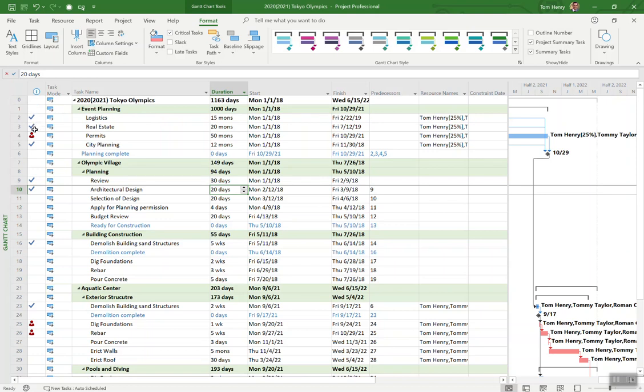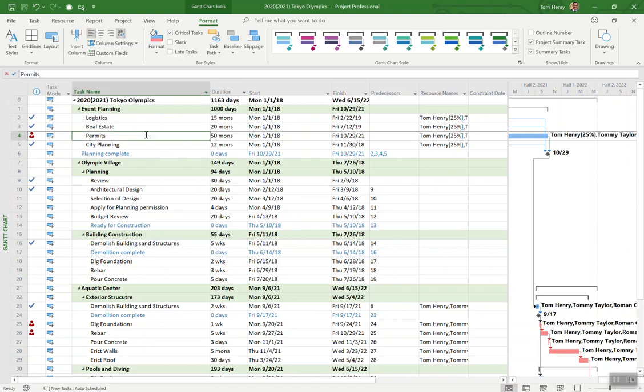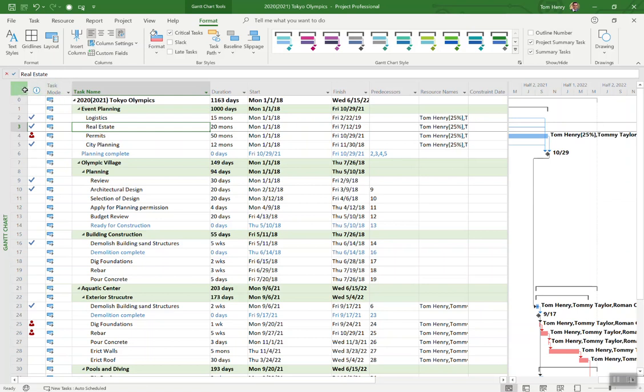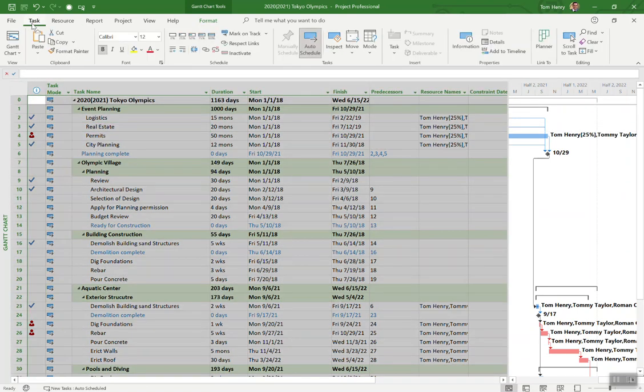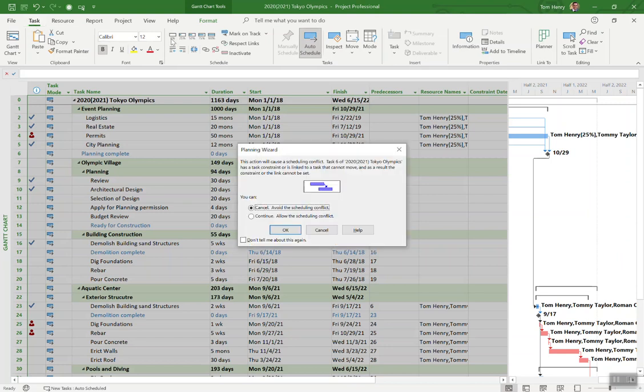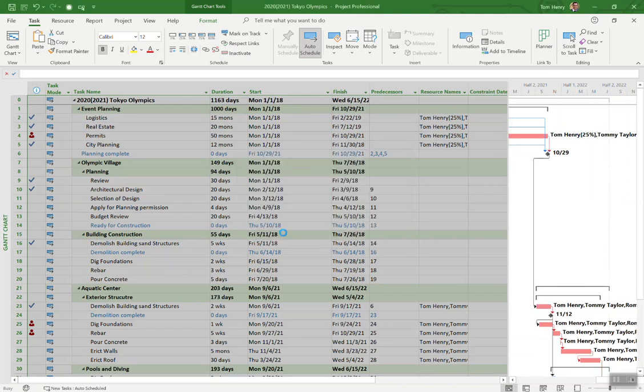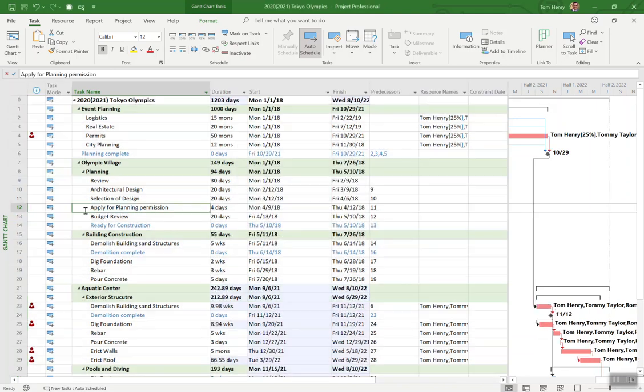You can see here that I actually have resources assigned that are over-allocated. I have tasks that have been marked as complete. Definitely not what I want. So what I'm going to do is click in the top left hand corner, which will select all my tasks. Come to the task ribbon and select zero percent. Continue, and now that's just gone in and said all my tasks are now zero percent complete. Nothing has been started.